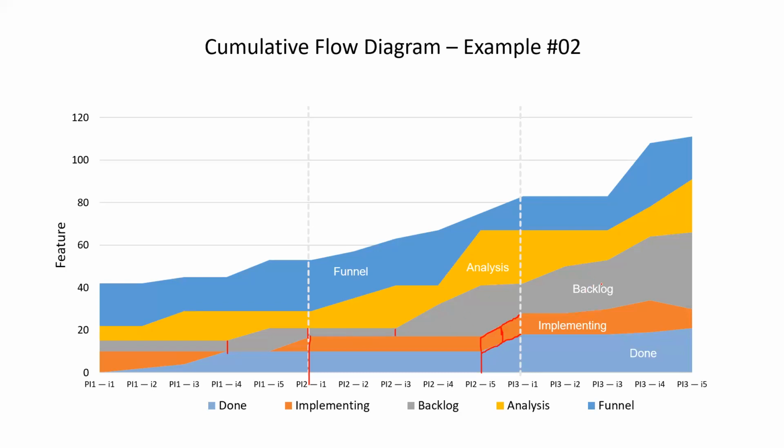Let's assume the backlog has no WIP limit. The implementing stage has the WIP limit. The backlog stage has no WIP limit. Have you observed the constant increase there? Isn't that a bottleneck? Because nothing is moving from the current state where we have a WIP limit, the previous stage is getting piled up. You got the point, Amol?